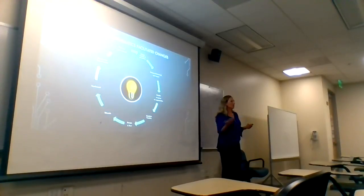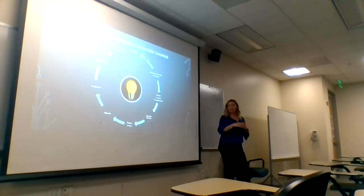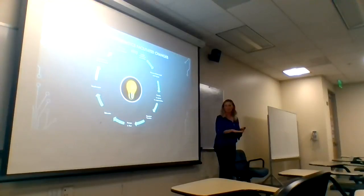If we have CMS coming through or the government saying, hey, you need to do this by January 1st, and it's now January 23rd, that one usually shoots up in priority for getting work done. If we're at risk for losing a lot of money because we're not in alignment, again, there are certain things that help bring items to the top and identify them as a higher priority. And then we establish a timeline. What's a realistic timeline? How can we get this in?